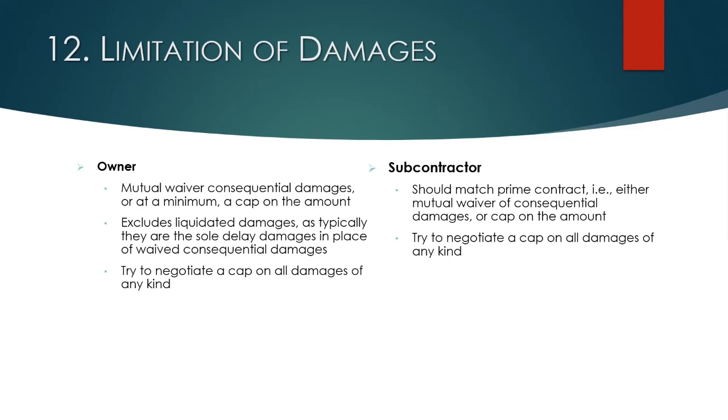Those are the dollars that the owner is going to claim day for day in damages if the project is not completed on time. Those are typically going to be the sole delay damages that the owner is going to be able to recover in the event the project is delayed, but you need to pay attention to those. And if the owner is going to demand that you agree to a liquidated damages provision, as a general contractor, you should not agree to a no damages for delay. It's kind of quid pro quo. If you're going to ding me on the delay that I cause, I'm going to ding you on the delay that you cause, and so I don't just get time, I get money.